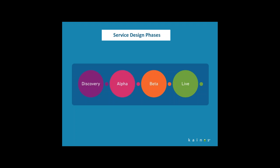Kainos uses a phased agile approach to service design, which closely follows the GDS pipeline, moving through a discovery phase to an alpha where we iteratively refine a prototype, through to a beta phase where we build out a solution that can meet the demands of a live environment. Everything we're going to talk about was achieved over an eight-week period of an alpha, with four developers working on site as an embedded team in the Surrey County Council office.